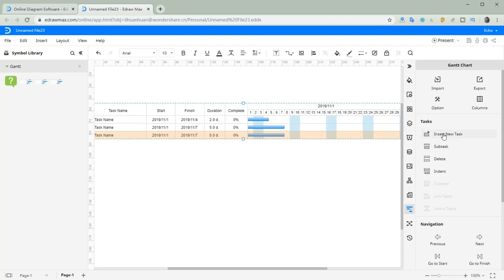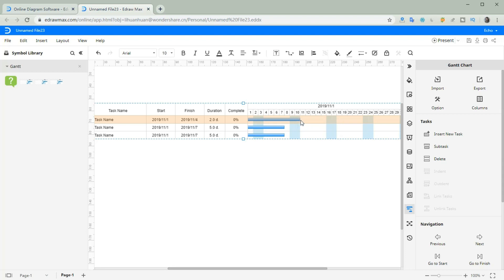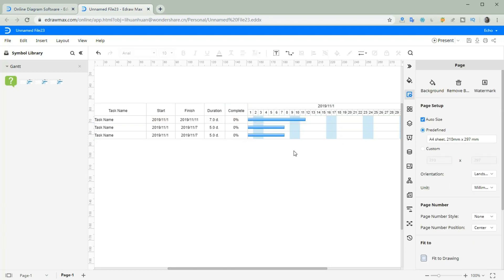Insert a new task. Hover your pointer on the end of the taskbar, then drag to change the taskbar length. The date will change accordingly.